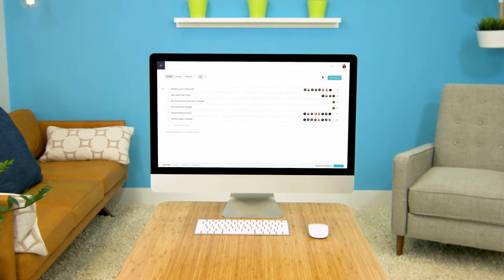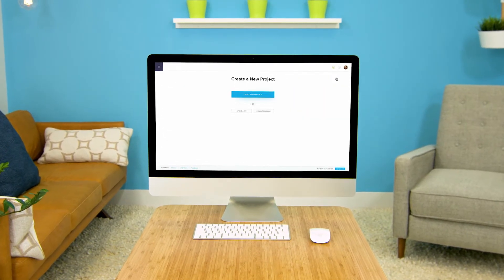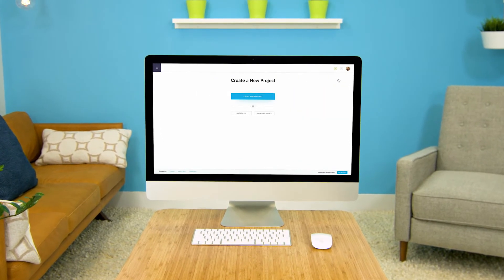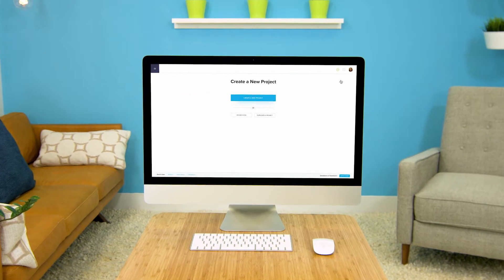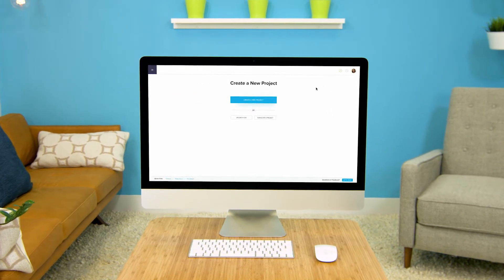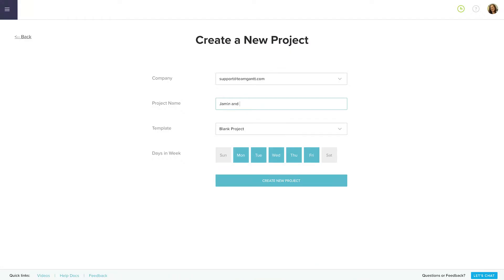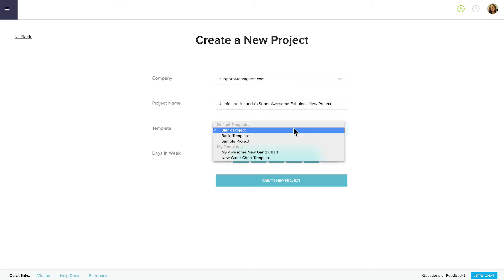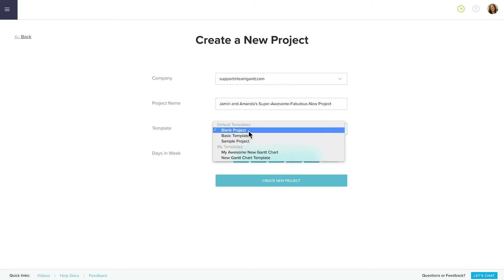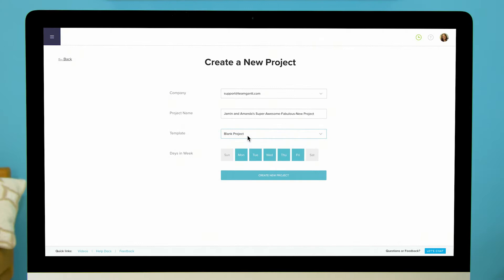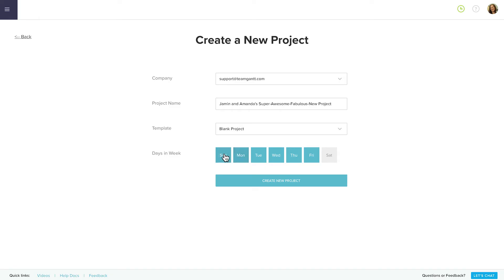Creating a new project starts at the new project screen. To get there from the home screen click the create a new project button. Now name your project and decide whether you want to create a blank project or use one of the default templates. If you want you can pick which days of the week you'd like to include in your project's timeline. Just toggle them on or off from here. When you're happy with how you've set up your project click create new project.